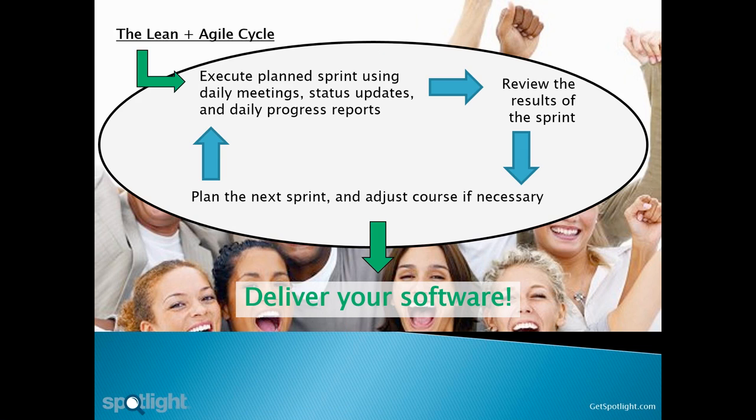Okay, so you started your day with accountability and communication. And then throughout the day, the regular status updates kept the team communicating and collaborating. Now, you want to end your day with more communication and accountability, what I call the daily progress report. Think of the daily progress report as an inverse scrum. So instead of saying what you did yesterday and what you're going to do today, you create a report recounting what you did today and what you will do tomorrow.